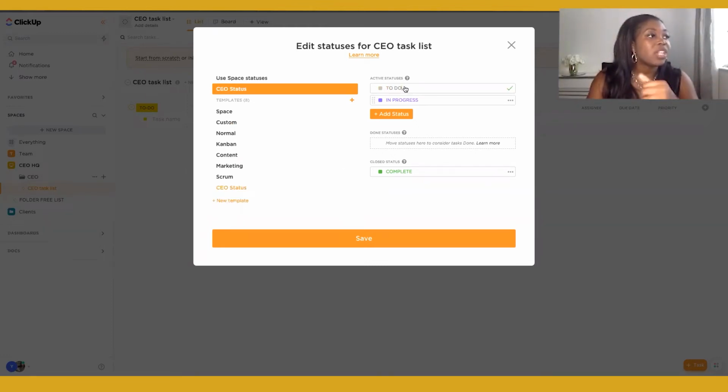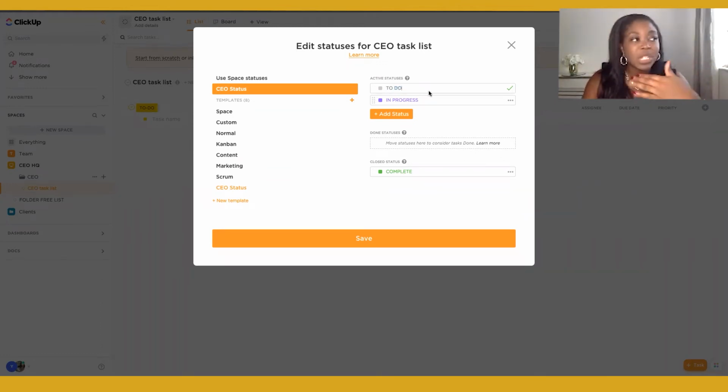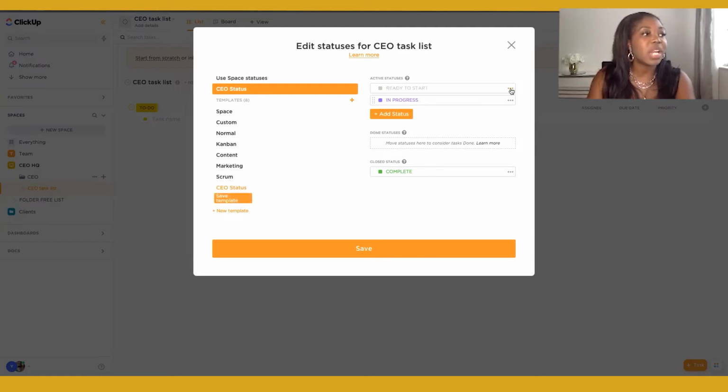Okay, so then you can actually say, what are the active statuses? What are the done statuses? So what are the statuses that say that the task is actually done, but you still need to keep it open and in view? And what is the status that says it's complete, it's finished? So for this particular video, I will just put, let's put ready to start. And you can actually update the color. So I can go to change color, and I can do that on this as well.